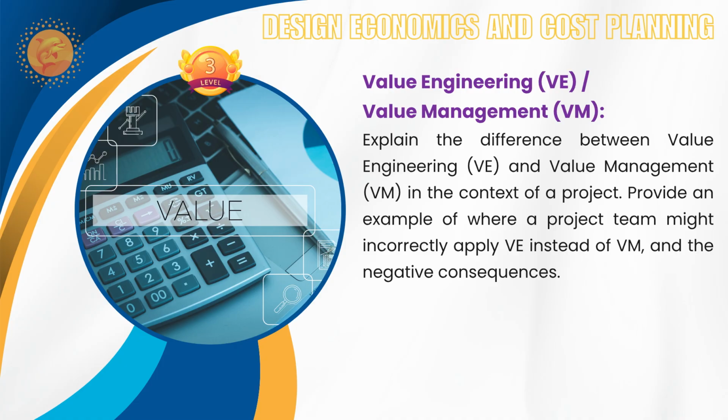Please go ahead. See, this value management is the strategic and complex procedure which is applied in the beginning of the projects. Value management and value engineering is the detailed engineering solution for the specific element of the project. So the basic difference in these two is the time of application, and second is that value management is the broad approach.